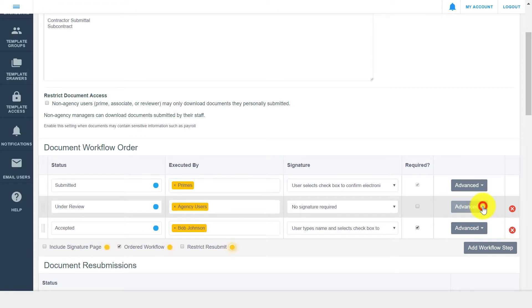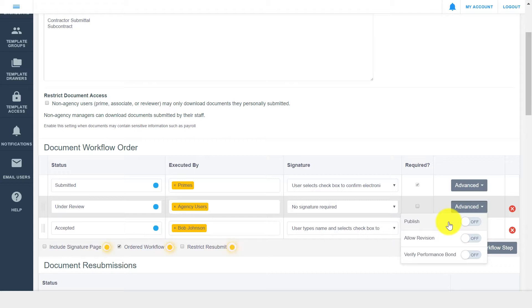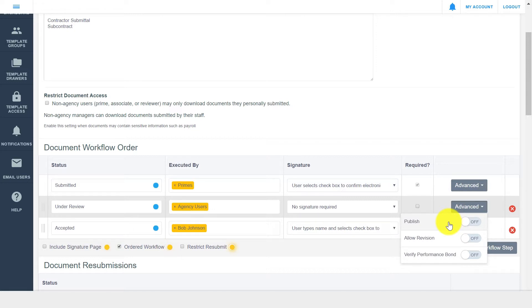For each workflow step, there are some advanced options, which you can toggle on as needed. The publish option allows a new version of the document to be published to a separate contract drawer when it gets to a specific step in the workflow. The original document remains in the current drawer, and a new copy of the document is displayed in the drawer you select to publish to.